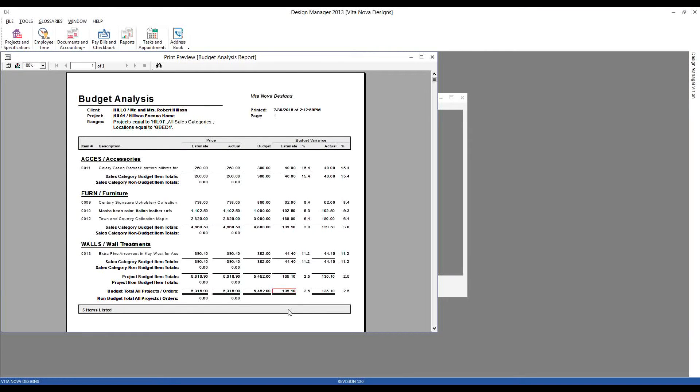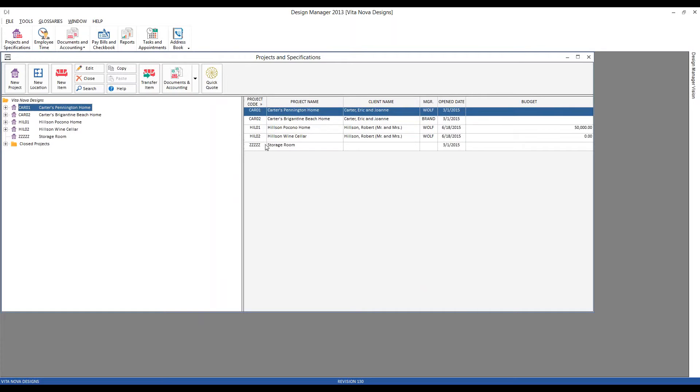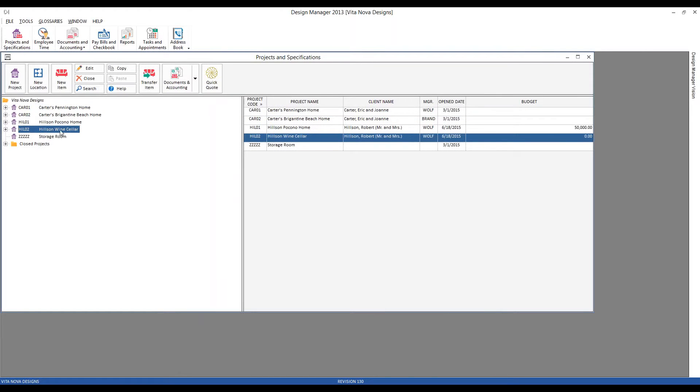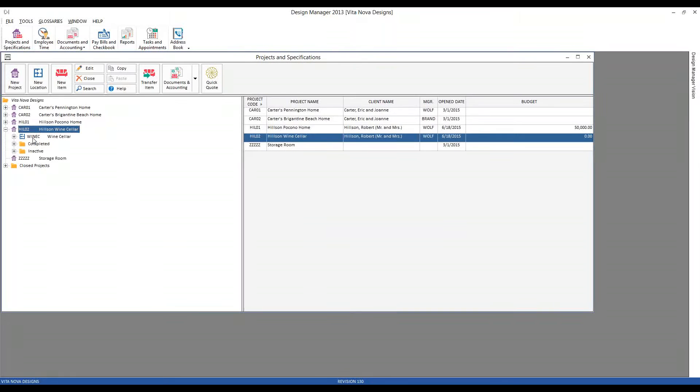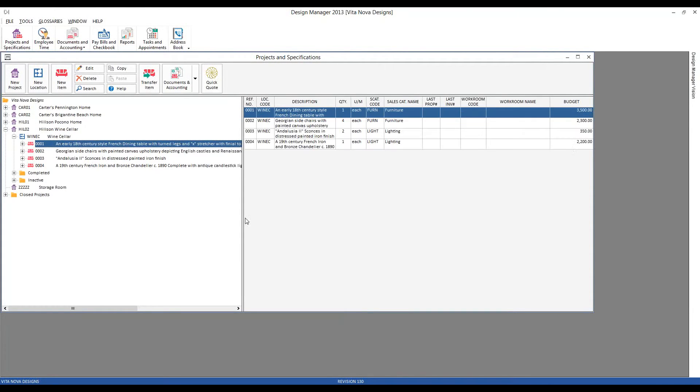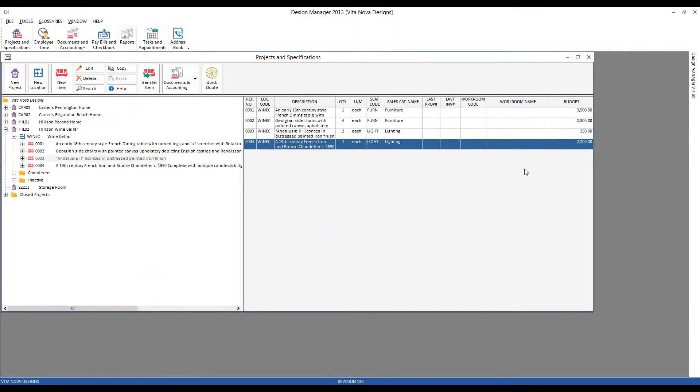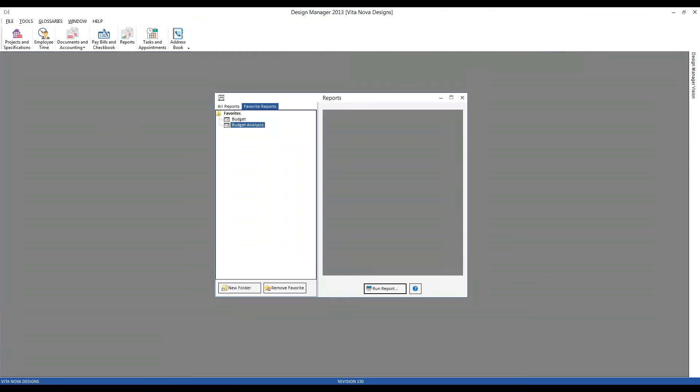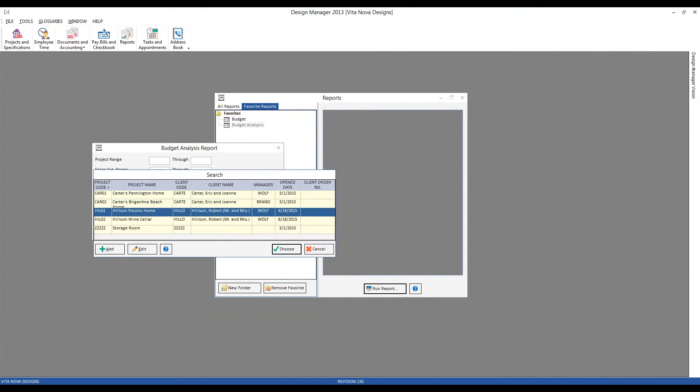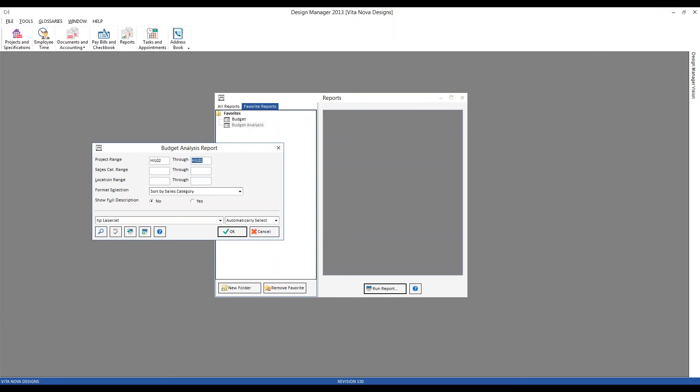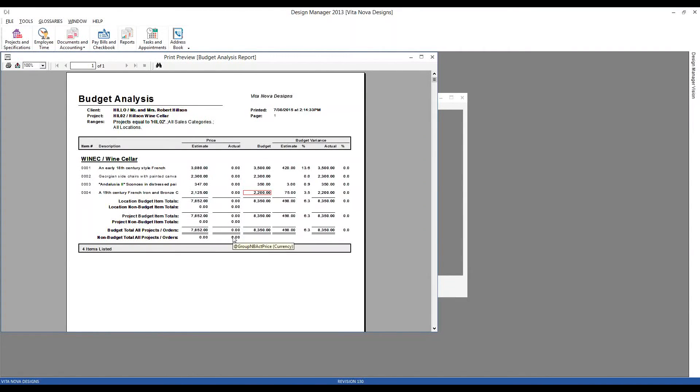Now, it's not necessary to have a budget created for the project or locations to have great use with the budget analysis report. For example, we can see that my Hilson wine cellar, I don't have a budget displayed for the project, nor for the wine cellar itself, but I have gone and entered budget for all the items. As we can see, our dining room table here has a budget of $3,500. So just by having our item budgets filled in, we can still use the budget analysis to track how we're progressing against that budget. So let's print it for our wine cellar project. And we can see, here's our estimated prices and our budgets, and how we're proceeding against those with our estimated variance. Again, upon invoicing the Hilsons, our actual values will be filled in as well.